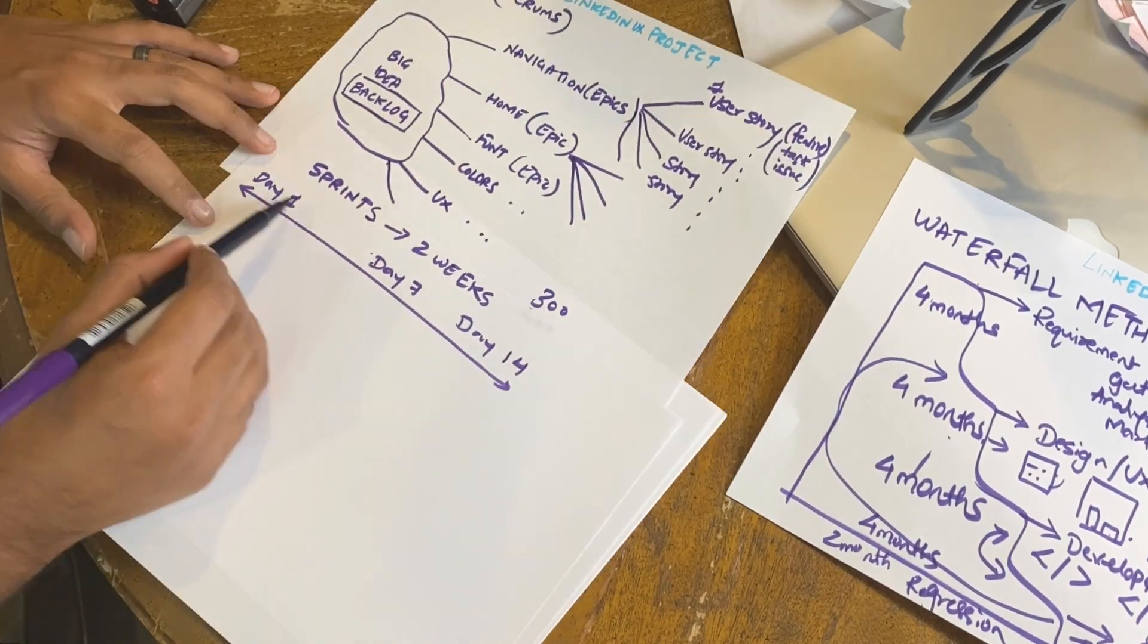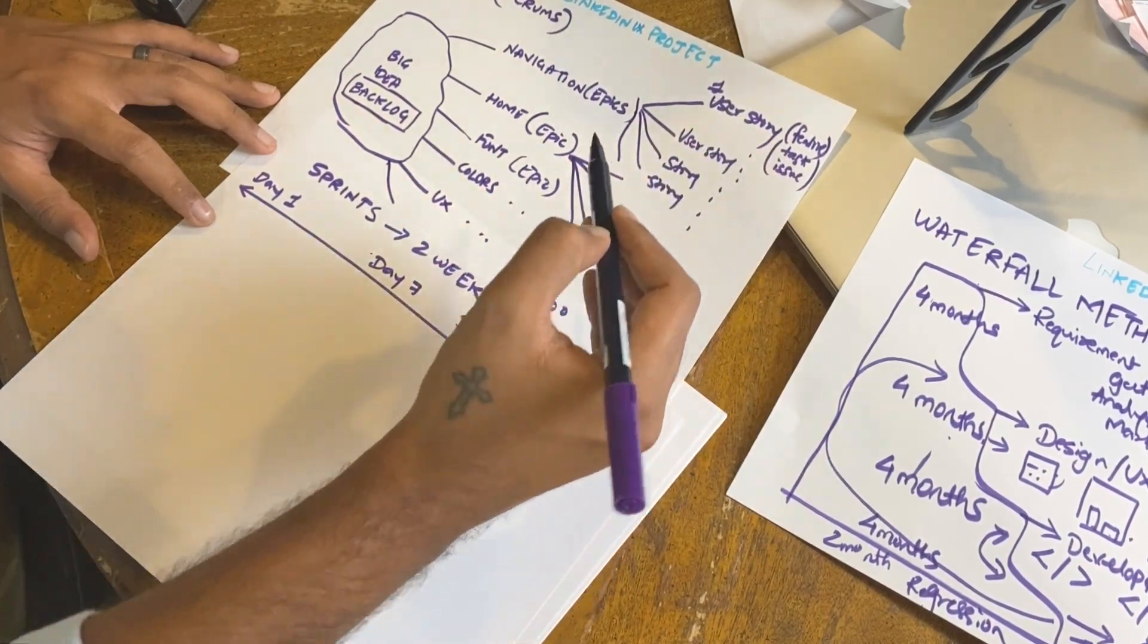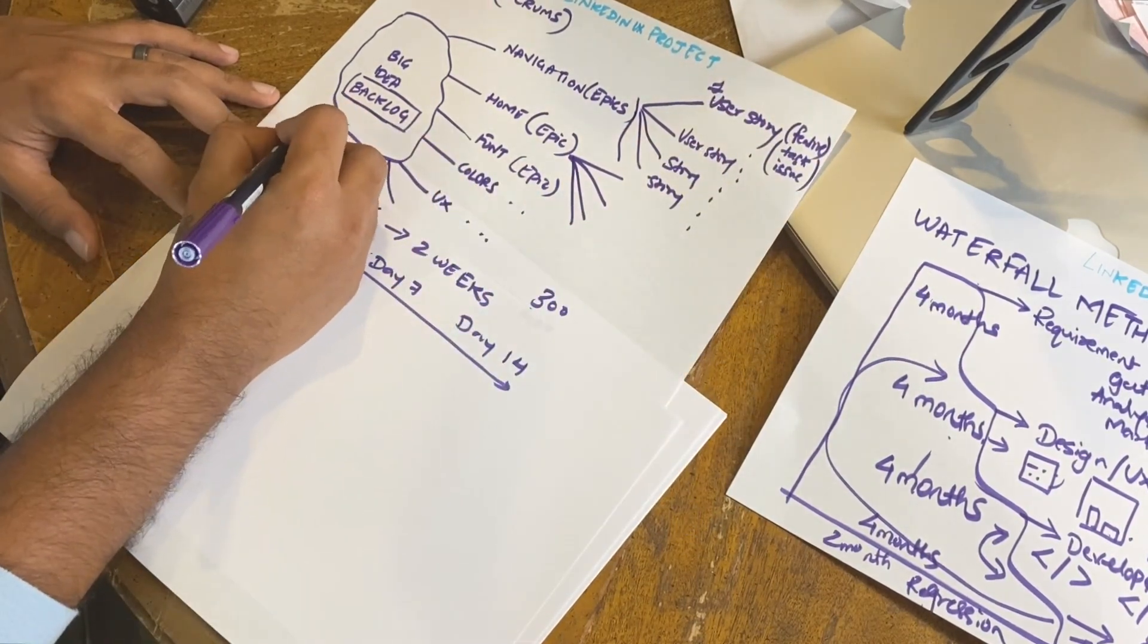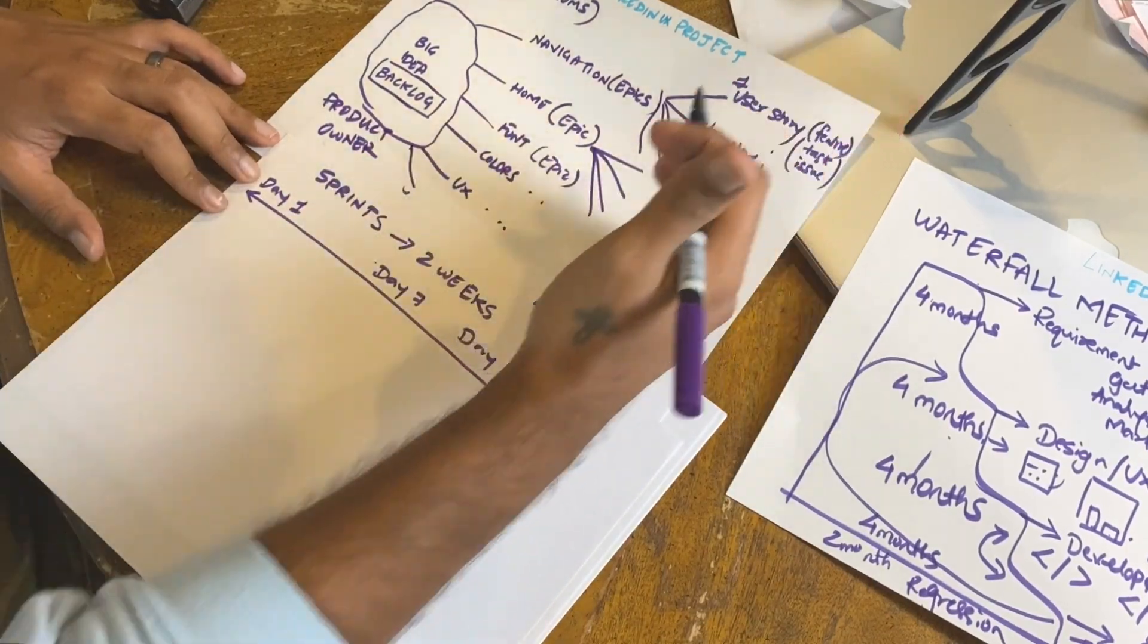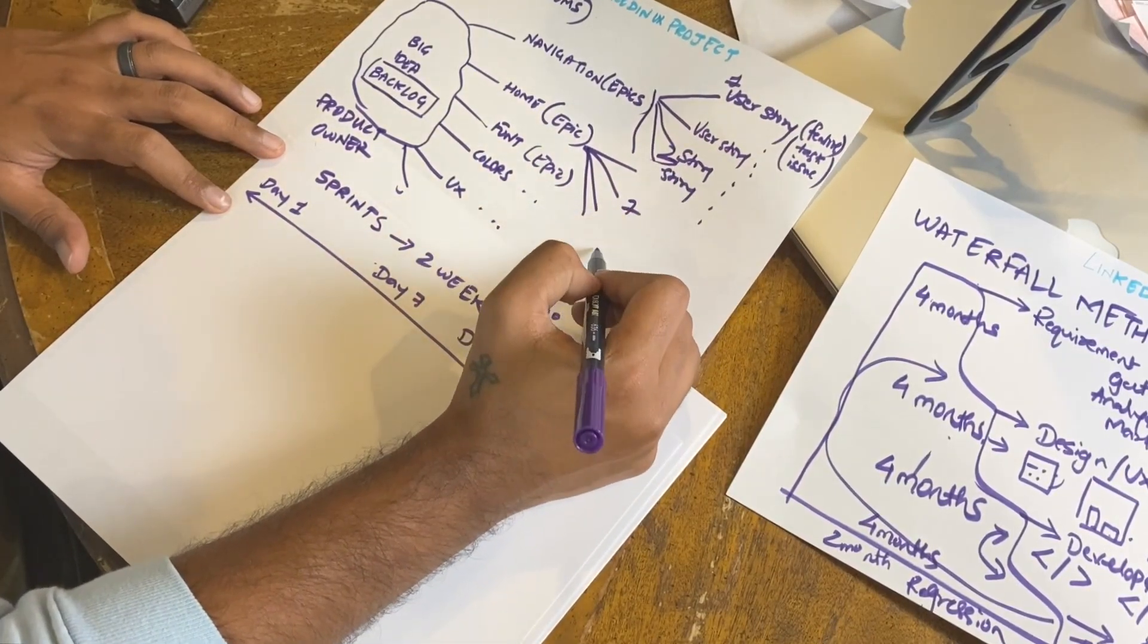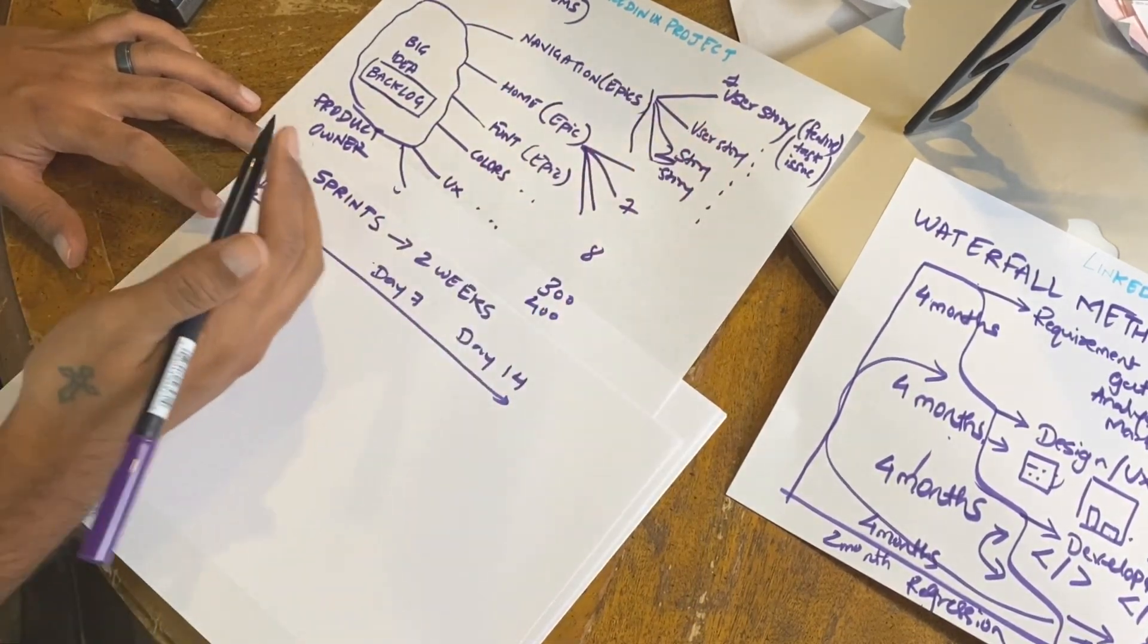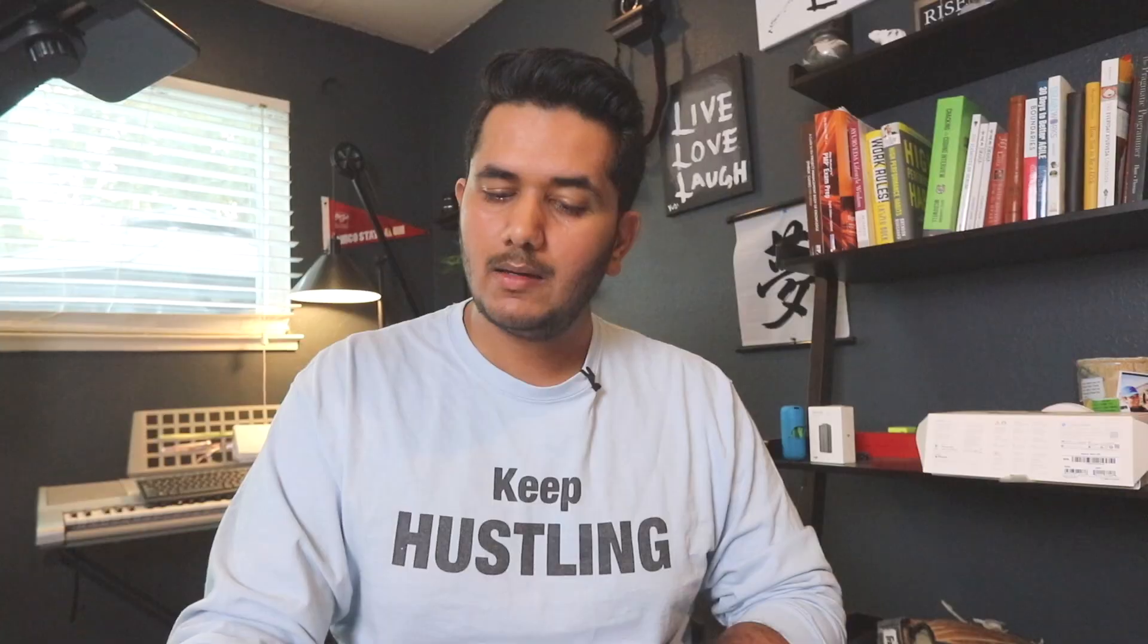In sprint planning, what happens is they decide which user stories need to be done. These user stories are prioritized by the product owner. Product owner is a little bit different than product manager - let me know in the comments if you want to know the difference. They decide which user stories in the sprint based on discussion with product managers and stakeholders. They decide their priority - it should be story one, three, seven, and eight. So they pick like five user stories. In sprint planning they plan based on the sprint team.